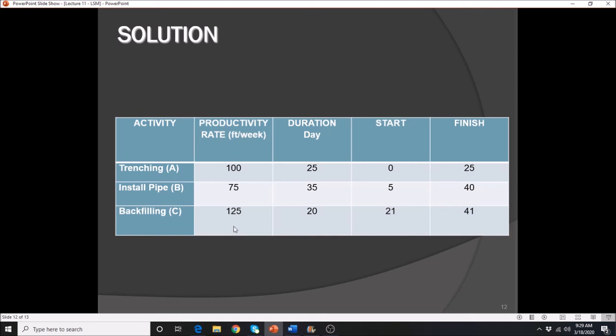Now for the next one, 500 divided by 125, that is 4 weeks. 4 weeks times 5, that gives you 20 days. So again, I converted to days because this one here says per week. That is a unit, so what you have when you divide is in terms of weeks. Those weeks multiplied by 5 days per week give the working days in each of these.